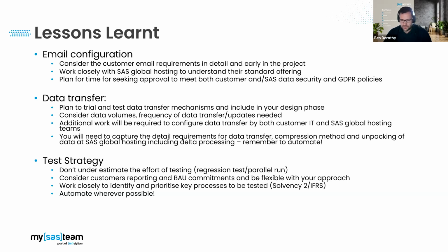So it's important to understand what the key priorities are in terms of processes to be tested, and obviously in this case regulatory ones were of utmost importance, and they were critical to gaining sign-off to switch to the new platform. So those processes were the ones that we tested as priority, and automating wherever possible.